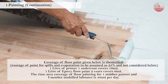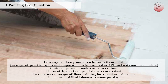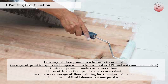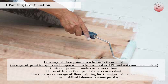Wastage of paint for spills and evaporation is to be assumed as 25% and not considered below. 1 liter of primer undercoat covers 10 meters square per coat. 1 liter of epoxy floor paint at 2 coats covers 6 meters square.